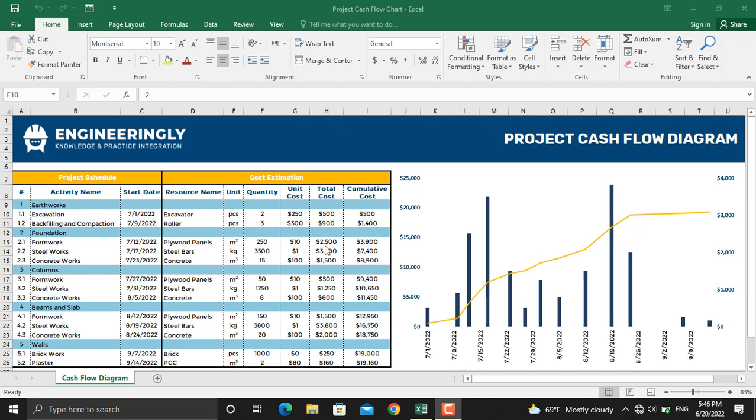In order to prepare the project cash flow diagram, we have the cumulative cost at the end of the table. If you update any of the values, for example the date, the quantity of resources, or the unit cost, the diagram will be updated as well.